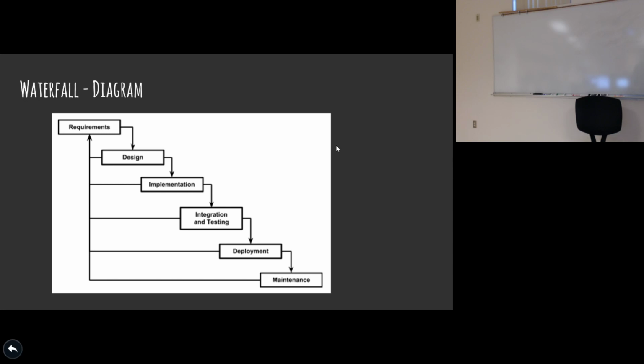The only people usually allowed to get involved in the requirements stage are business. They decide what we're going to build and decide all the requirements, make this big, elaborate 100-page SRS document, and then at the end somebody signs off, probably the CEO, and says, yes, this is good, go get started on writing it. They may have spent a month, 3 months, just working on that one document.